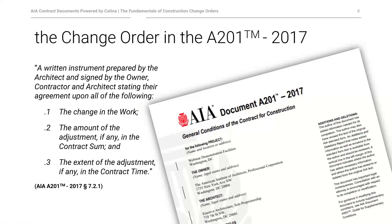This webinar focuses on the change order, which is defined in Section 7.2 of the A201 as follows: a change order is a written instrument prepared by the architect and signed by the owner, contractor, and architect stating their agreement upon all of the following — the change in the work, the amount of the adjustment, if any, in the contract sum, and the extent of the adjustment, if any, in the contract time. Sal will now discuss the causes and impacts of change orders on the project.